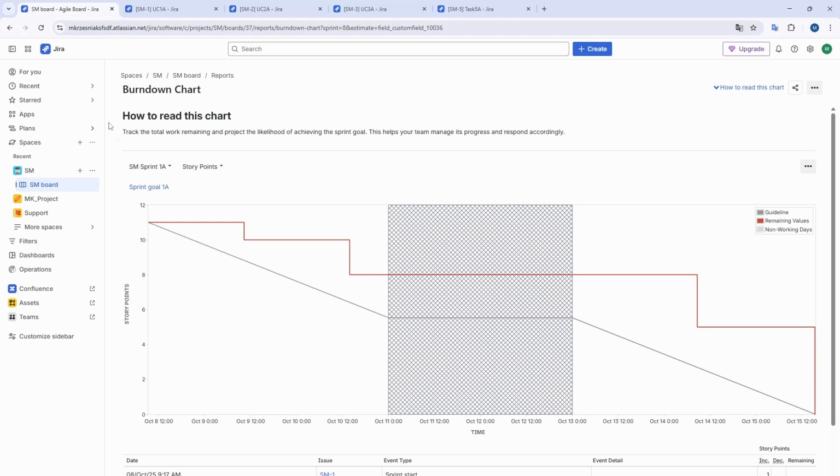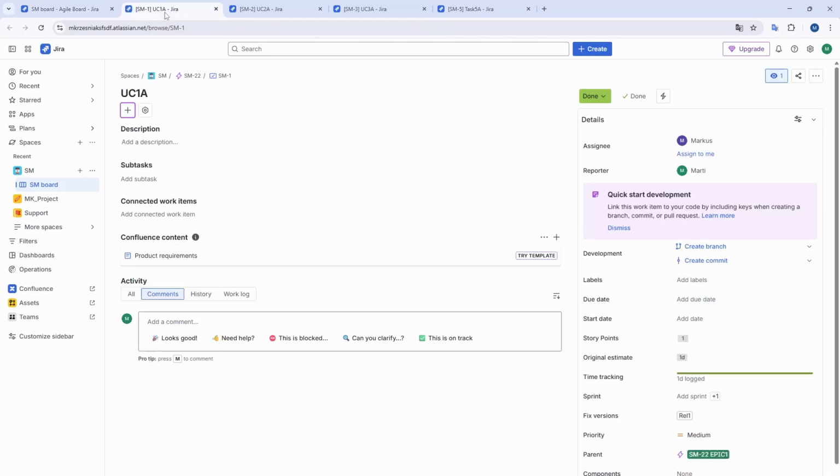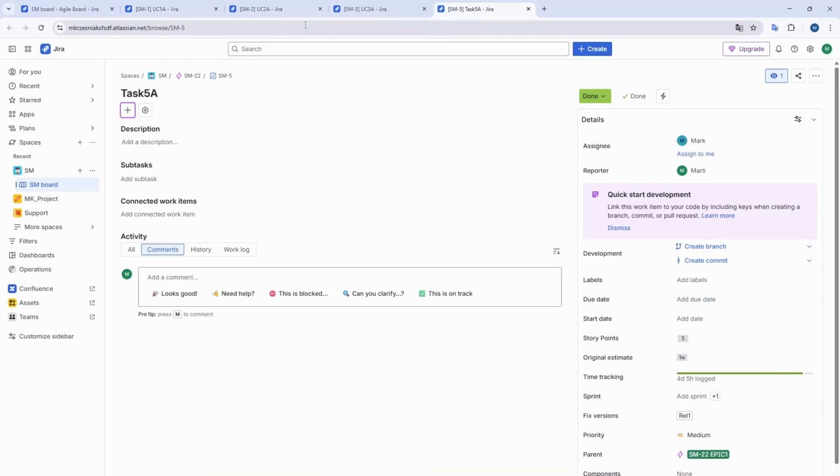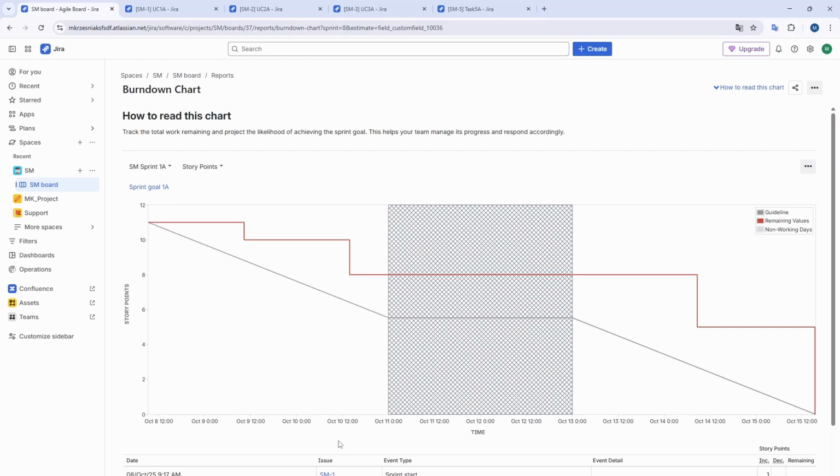We will use Jira to show Burndown chart. As you can see, it can be visualized in 4 variants: story points, issue count, original estimate, and remaining time estimate. To demonstrate this, I created a sample project in Jira and sample sprint. In this sprint, there were 4 tasks: ISIM 1, ISIM 2, ISIM 3, and ISIM 5, each with the following estimates assigned.